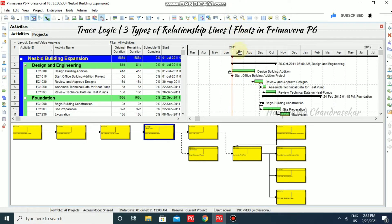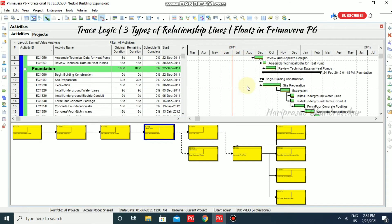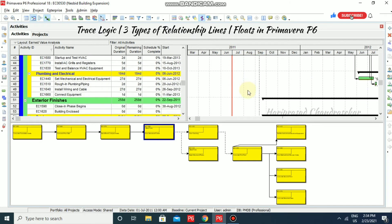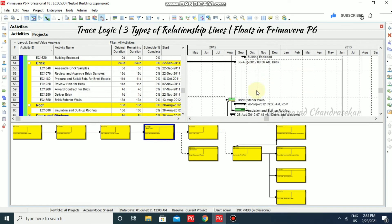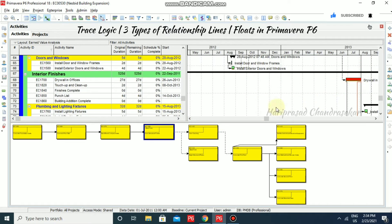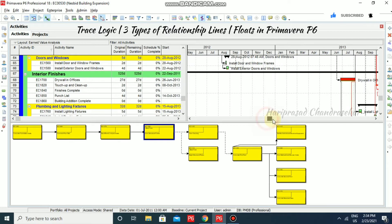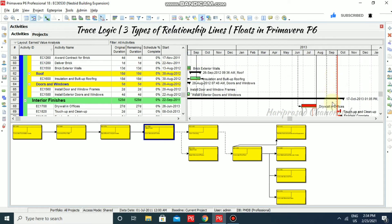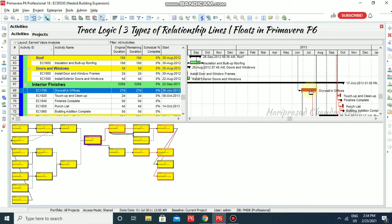Now it is on a weekly and monthly basis — yearly basis — and yearly basis we also have months. Now we also have some critical activities in this project. We can identify them based on the red color lines or red color bars — those indicate a critical activity. We can also see the relationship line with the critical activities, so we will consider this example.